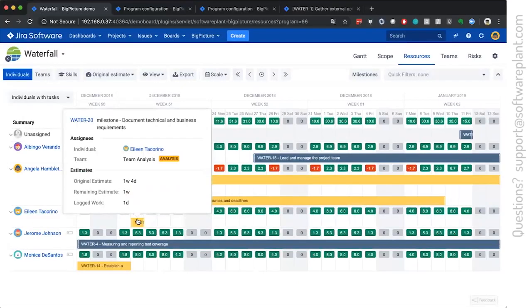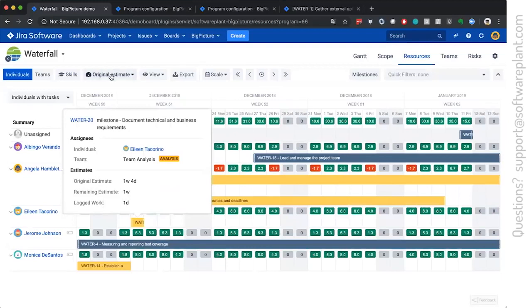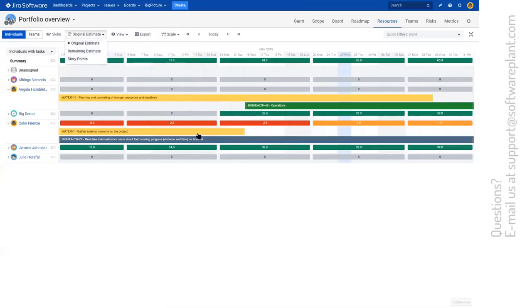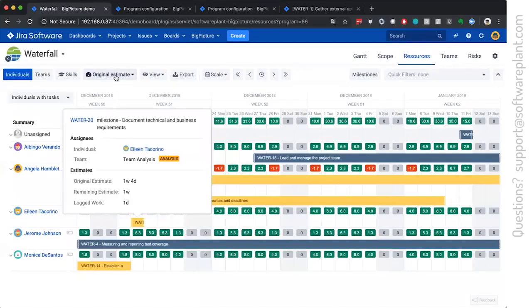This is a ticket which has an original estimate one week four days, remaining one week, logged work one day. And the estimates are coming from the original estimate, but they don't have to. They can be taken from the remaining estimate or from story points for the agile folks.